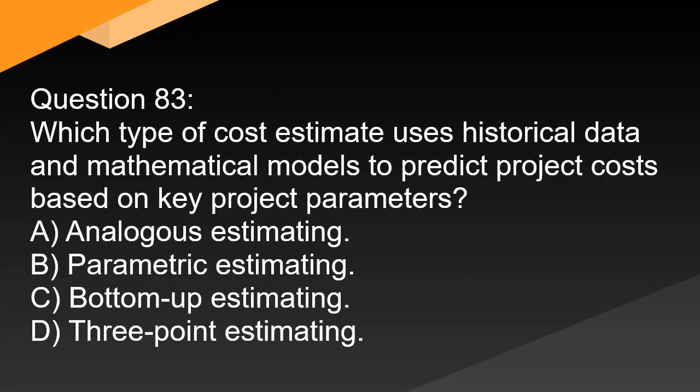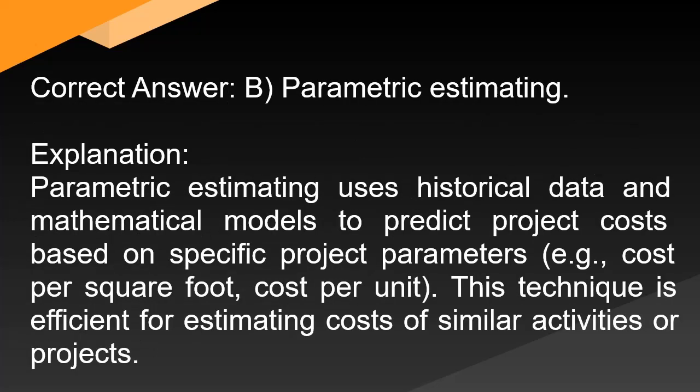Question 83: Which type of cost estimate uses historical data and mathematical models to predict project costs based on key project parameters? A. Analogous estimating. B. Parametric estimating. C. Bottom-up estimating. D. Three-point estimating. Correct answer: B. Parametric estimating. Explanation: Parametric estimating uses historical data and mathematical models to predict project costs based on specific project parameters (e.g., cost per square foot, cost per unit). This technique is efficient for estimating costs of similar activities or projects.